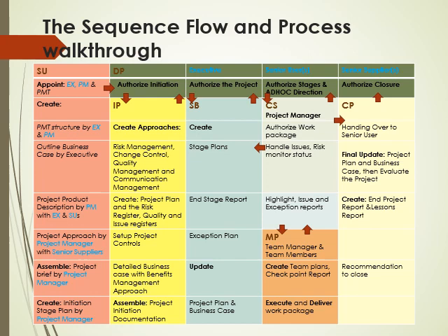I'm also going to show us the sequence equation that I created in the next slide, but let's go through one after the other. The first process that the project kickstarts with is always the starting of a project process. That is triggered by the corporates when they create the project mandate. So what happens is the first thing in the start of the project process is the appointment of the executive. The executive, as we all remember, is the representative of the business stakeholders. So that's the executive, and it's part of the project board as well.